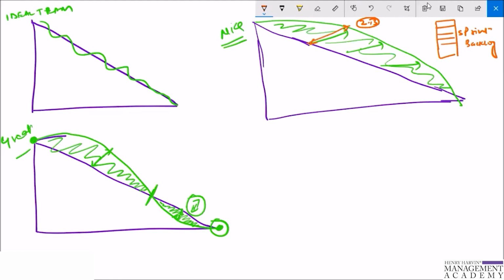Say suppose it is like this, and the team has taken a total of 40 story points, and there is 5 points of extra work coming, and we are adding it somewhere. So what we can do is remove some work from here. When we do that, we would be able to compensate the stories that have been done in the sprint, and the team would not get into this situation where there is an increase in the work. So what will happen in that case, when a few stories are added, there's a dip in the graph and it will come like this. Why? Because we have removed a few stories from the sprint backlog. So this is another way of displaying the chart.